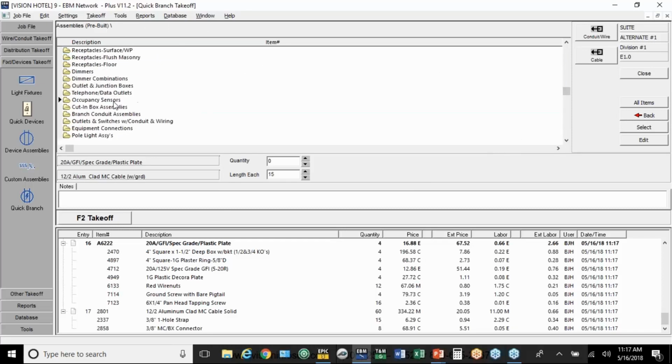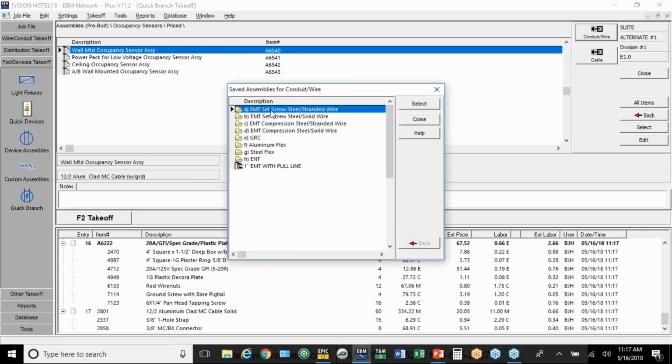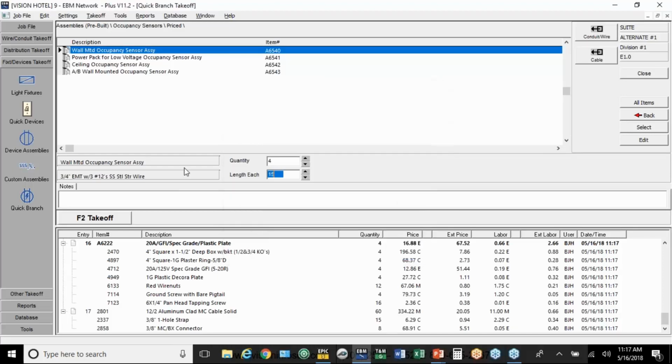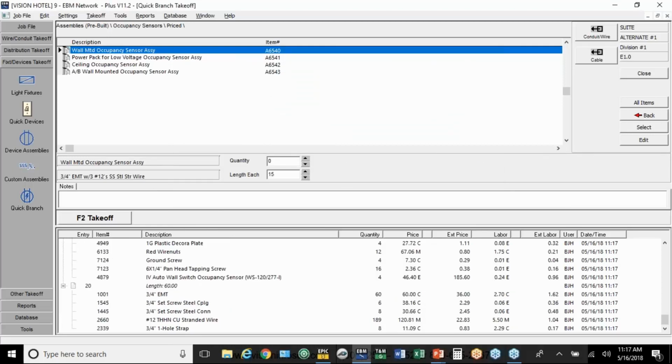We've got a folder down here. We'll do priced, wall mounted. Let's say there's 4 of those. Let's even change the wiring back to conduit. Now, I just made a mistake here intentionally. Those should have gone into the common area, not into the suite. That's why I wired them in conduit. But I've got them in the wrong location. The way you fix that, again, is to open up the audit trail by double-clicking.